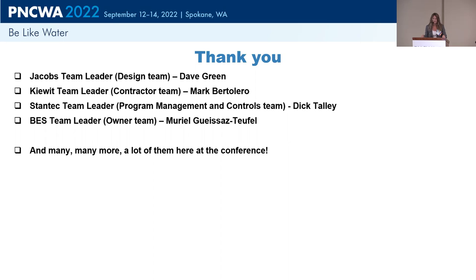So the costs were getting up, and so we had workshops, and at the workshops it was a little bit of a competition. Every team went back to their drawing boards. And so Dave, you can speak to how you did it internally, but we had on the shared Excel sheet a tab for BS, a tab for Jacobs, a tab for Kiewit, and everybody from their teams put some ideas, some proposals in that spreadsheet, explained it briefly and said why would you change it. And then it was a little bit of a competition, like, hey, I got this idea. And then the person would have to talk about the proposal. And then as a group, it was all virtual, as a group, we would green, red, yellow light it. That's how it happened.